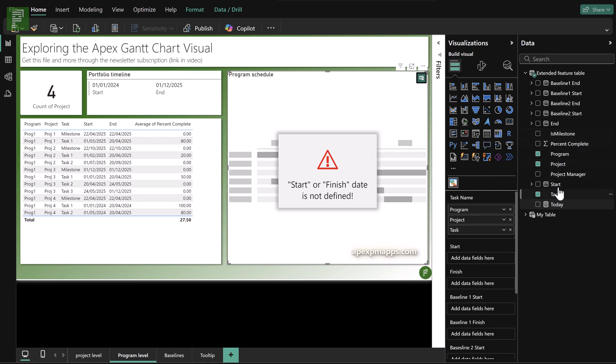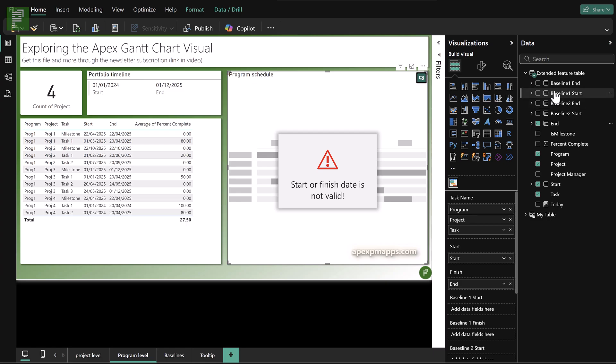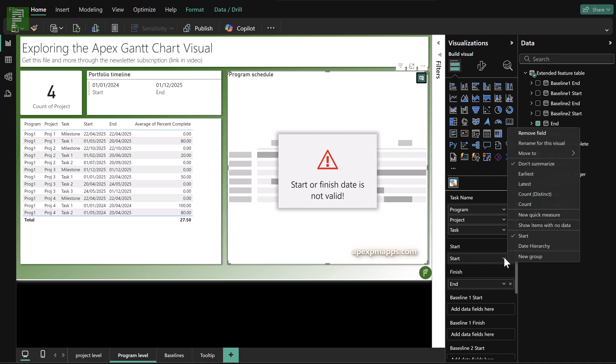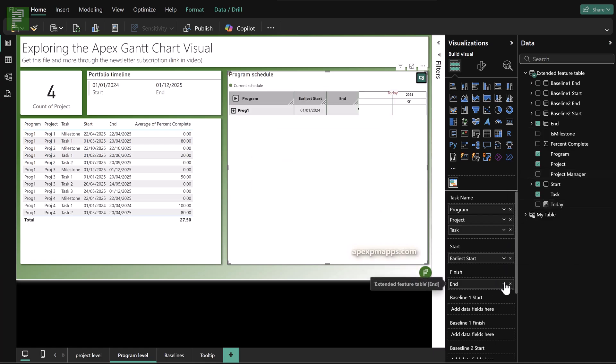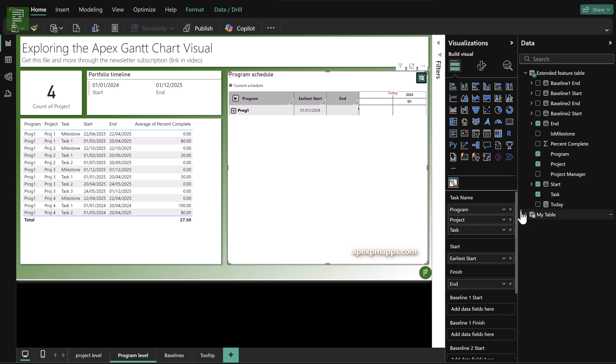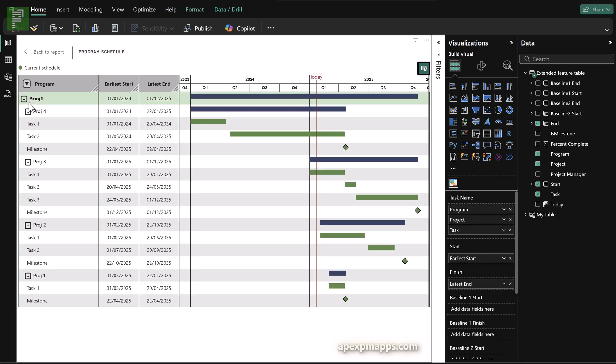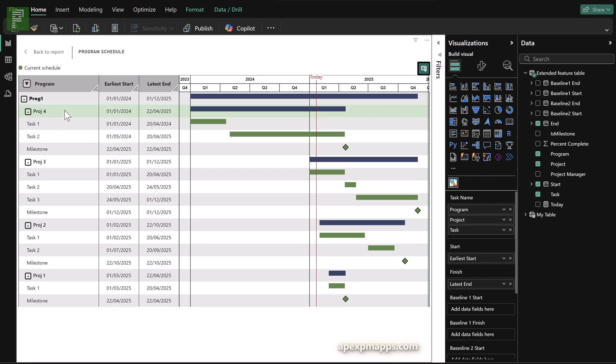And let's start populating this visual with my extended features table. So we have the program, the project and the task. So this is two layers extra compared to the previous section. Now I also had the is milestone because I thought that that was needed, but actually it wasn't needed because the tool itself will know when you have a start date and a finish date on the same day. It will automatically start changing that to a milestone. Remember to have your start date being the earliest and your end date being the latest.